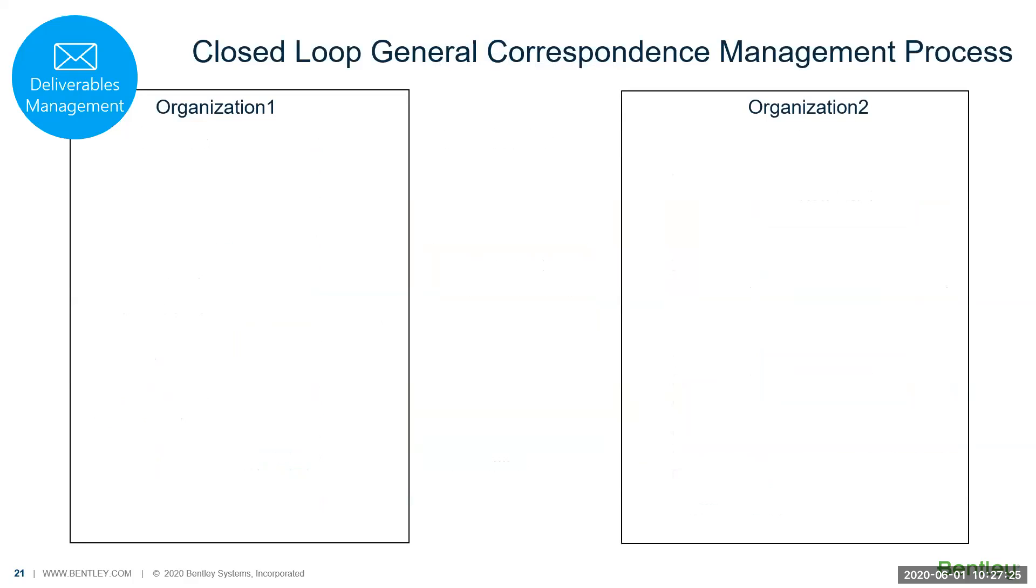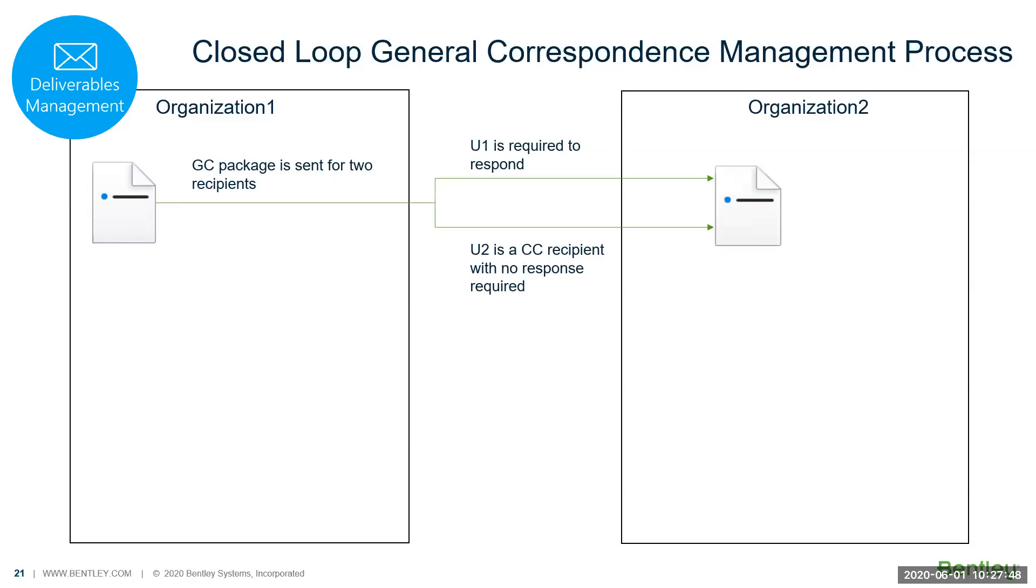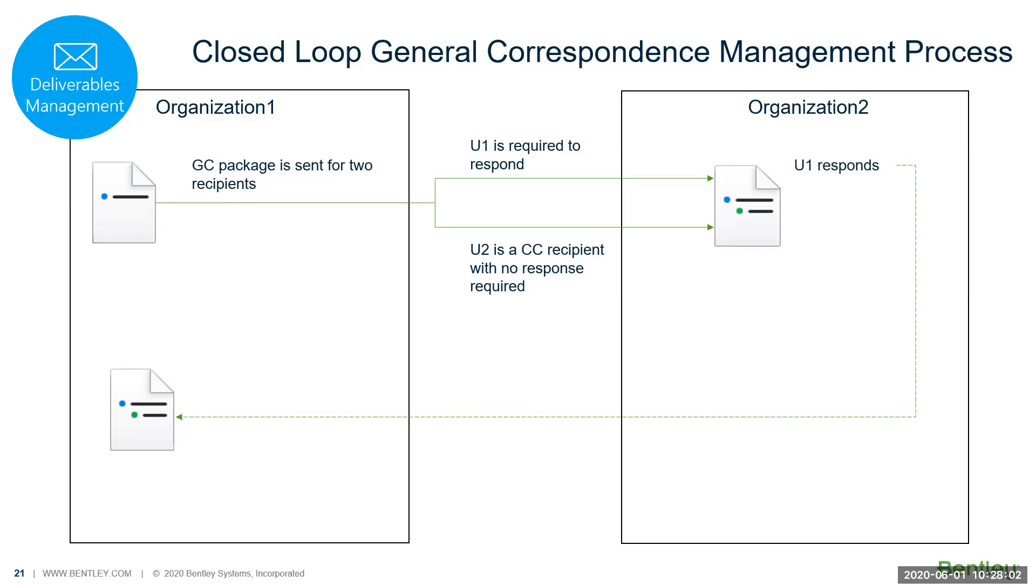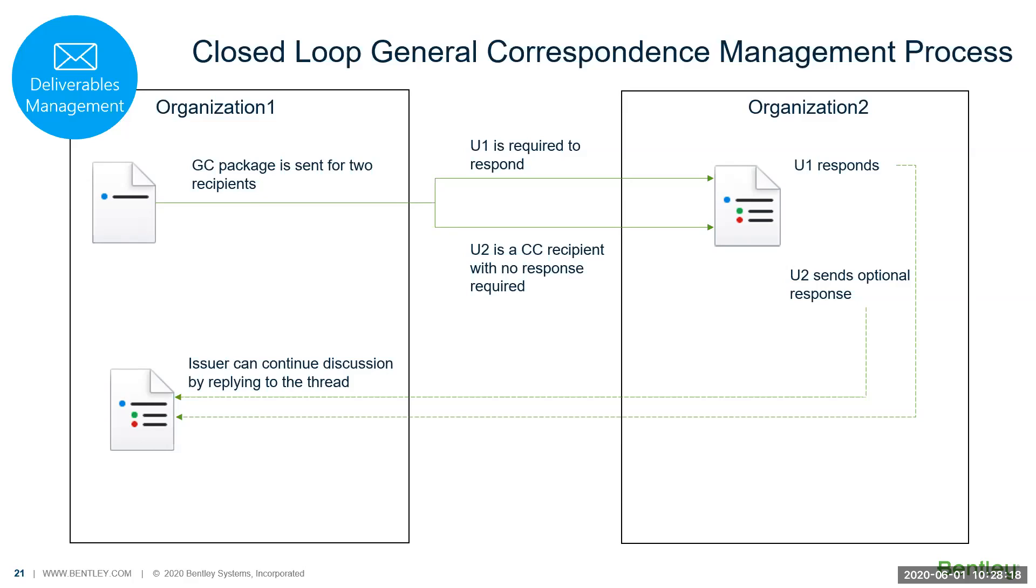The third one on deliverables management is general correspondence. General correspondence can be things like letters or memorandums that you want to create. You can label that general correspondence to letter, memo, or site memo—up to you. The system is flexible. You can send to multiple people. User one is required to respond, you put a date—seven days to respond. User two, you never put a date, so there is no need for user two to respond. User one, once they respond, it goes back to the sender. But user two, if they decided they wanted to add comments, they also can respond back to organization one. If user feels they need to continue with the conversation, they still can issue and continue and reply to the same thread, and all the conversation will be in the same threading.